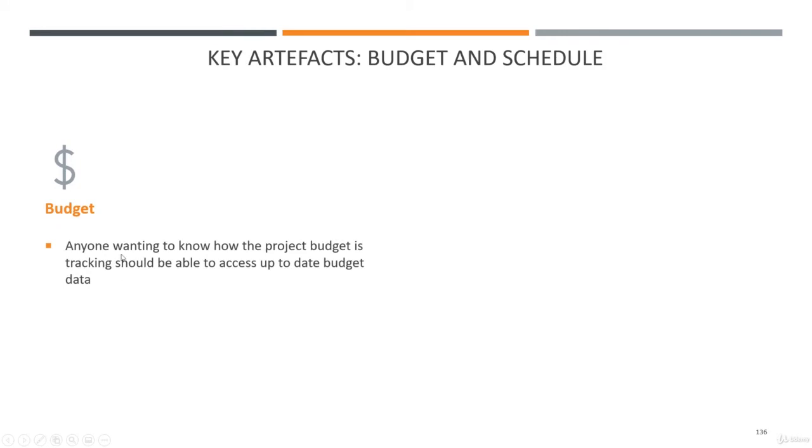So anyone coming to your desk, say, where are we at with the budget, you should be able, without hesitation, to say, yes, I have it there in my spreadsheet. If the company has a central way to track budget, put it in there as well. But sometimes they are a bit clunky and they are only updated every month. So go beyond and have your own way to track your budget at a more granular level.